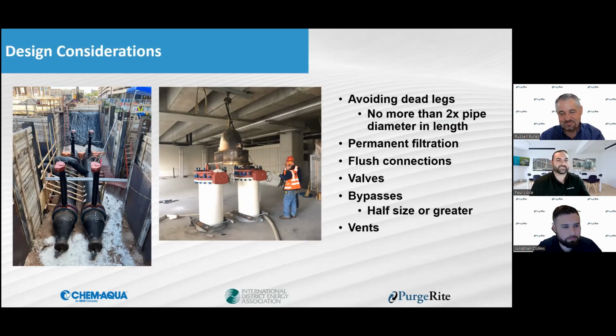The only way we could possibly treat that would be if each one had a tap on the end and we injected chemical from the back end. But that's buried, so without a proper bypass, and if you're at that point in the process and design, any kind of changes are going to result in delays, right? So can you put a bypass in there at that point? You're probably going to get a lot of pushback, and that might even be written up in the final documentation from a water treatment company.